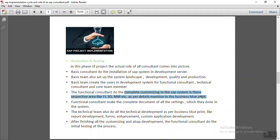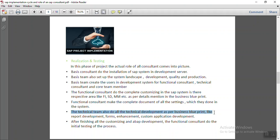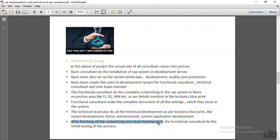All functional consultants of different modules — FI, SD, MM — do the complete customizing in their respective business areas during the realization phase. The functional consultant must document all the settings done in the system so that any other consultant can refer to the document and understand what has been configured. The technical team also carries out development as per the business blueprint, including report development, form development, enhancements, and custom application development based on functional specifications provided by the functional consultant. After finishing all customizing and development, the functional consultant performs initial testing of the business processes.